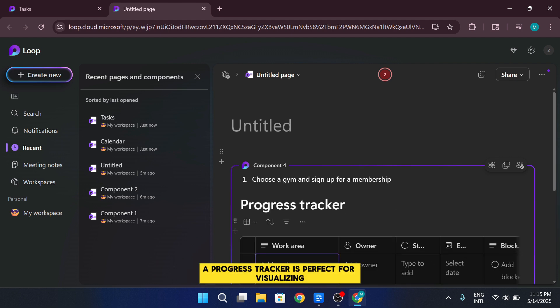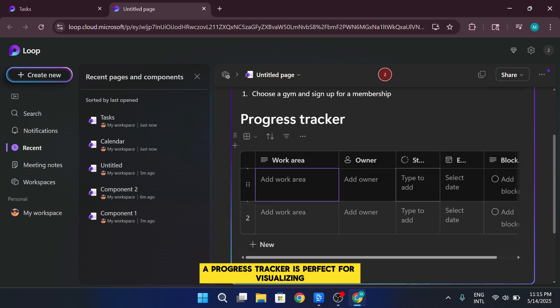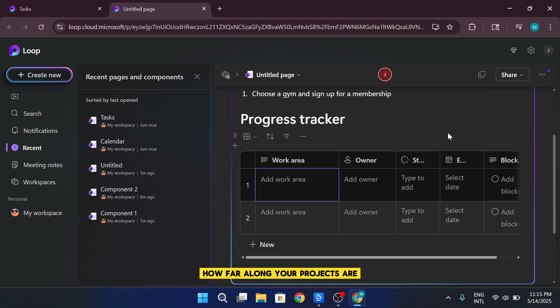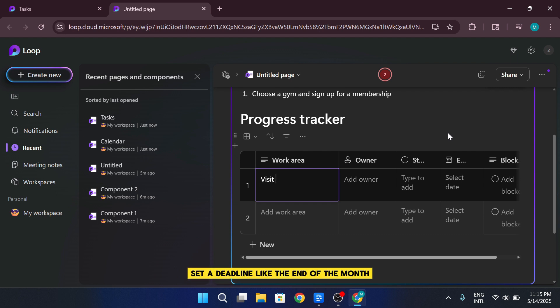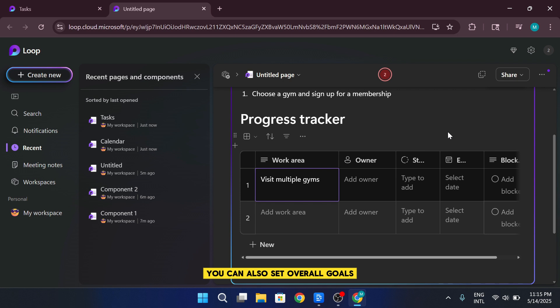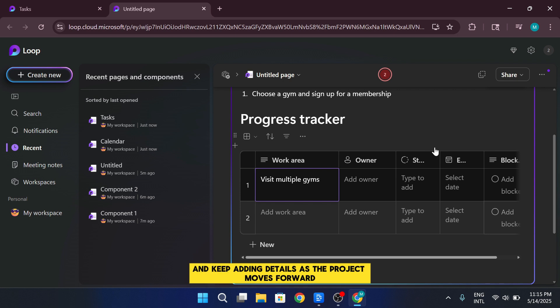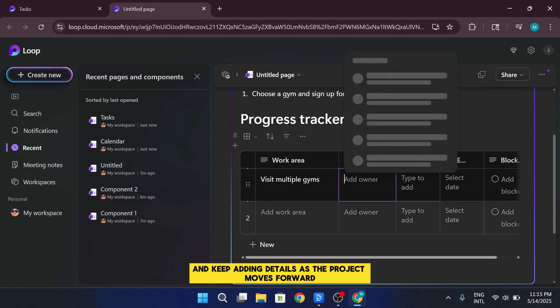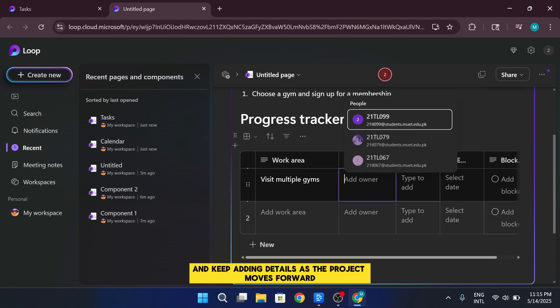A progress tracker is perfect for visualizing how far along your projects are. For instance, you can create a tracker, assign yourself as the owner, set a deadline, like the end of the month, and include any blockers, such as content creation or other dependencies. You can also set overall goals and keep adding details as the project moves forward.